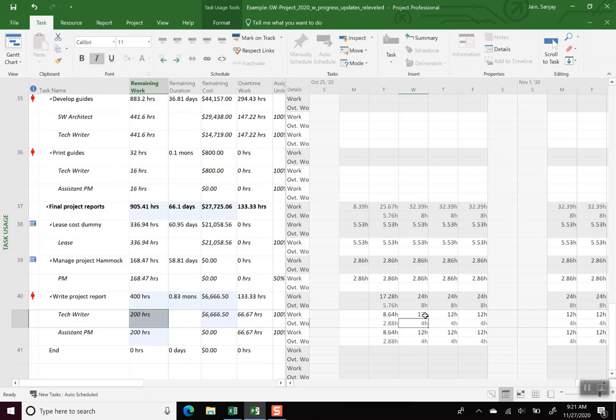of verifies our calculations were correct. Now each day we have 4 hours of overtime, and the total work hours are 12, so 8 hours of regular time and 4 hours of overtime. And so the numbers work out since there are not changes in variances and so on that we did for the in-progress activity. For an activity that is in the future compared to the status date, these calculations work out pretty exact.